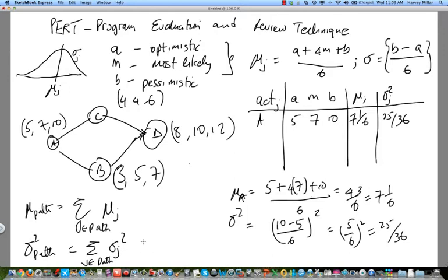So what's an example of this? If my path is A, B, D, then all I'm saying is, so let's just take path A, B, D as an example. Let's see here. A, B, D, so the mean for that path would then be mu A plus mu B plus mu D, which we would get from the table right here. And then the variance of that path would then be sigma squared A plus sigma squared B plus sigma squared D.